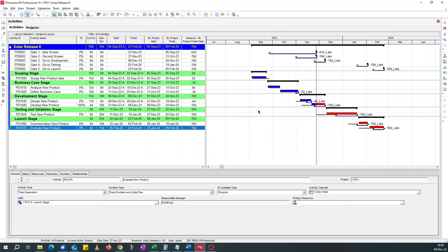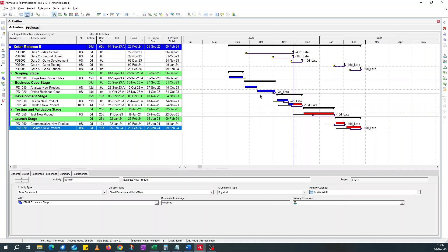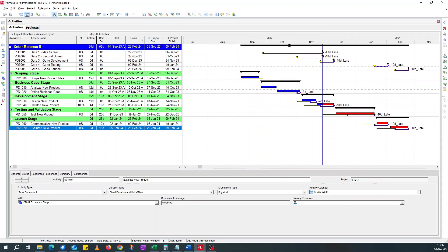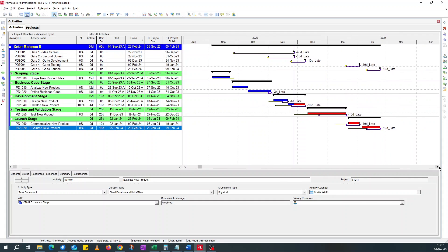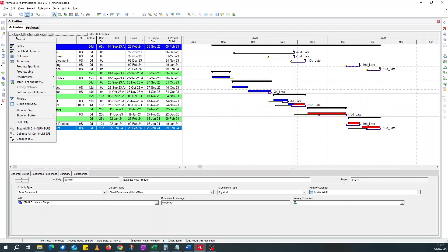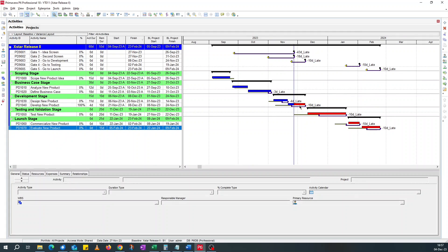You can also hide this variance field. So this is very visible to show activities that are late. In the same vein, if you want to show activities that are ahead of schedule, but I don't normally like drawing attention to activities that are ahead of schedule. The focus for me is activities that are behind schedule so that you can intervene and fix them.